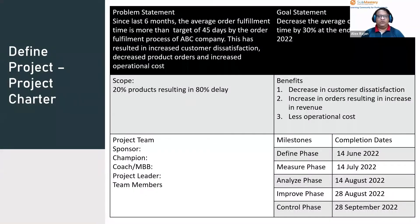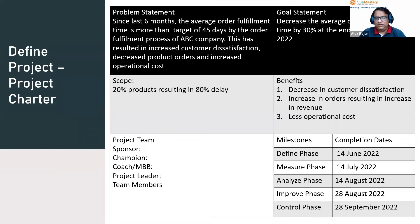Both deliverables, we define the project charter. The project charter includes a problem statement, the goal statement, the scope of the project, benefit of the project, the project team — who is going to be the project team members — and the milestones, where we write the completion dates for each phase.